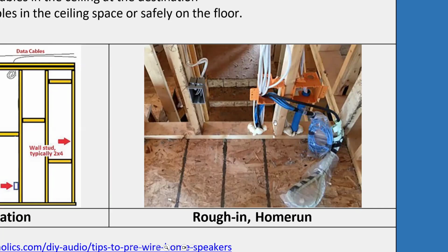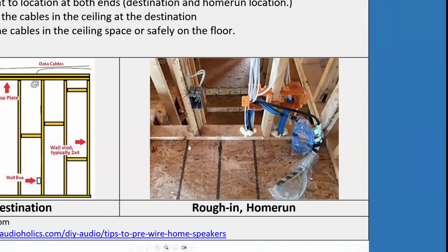So I did some foreseeing action here. I wrapped them in a plastic foil, lifted them off the floor a little bit, just so if the floor people come there and they have to do their thing, they have to do very little to my wires to push them aside. Okay. So that's one of the situations.